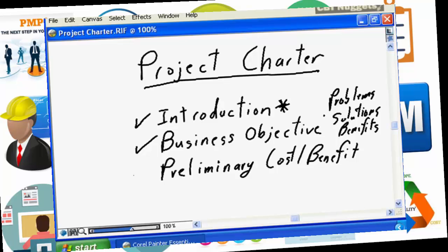And my experience is, any document that you send up the chain to senior management for approval must absolutely contain a cost-benefit statement. It's wonderful to say we have a business problem and we have solutions and here are the benefits, but my experience with management is they're not going to approve any document for committing of funds, committing of resources, until they know what the overall cost benefit is going to be.